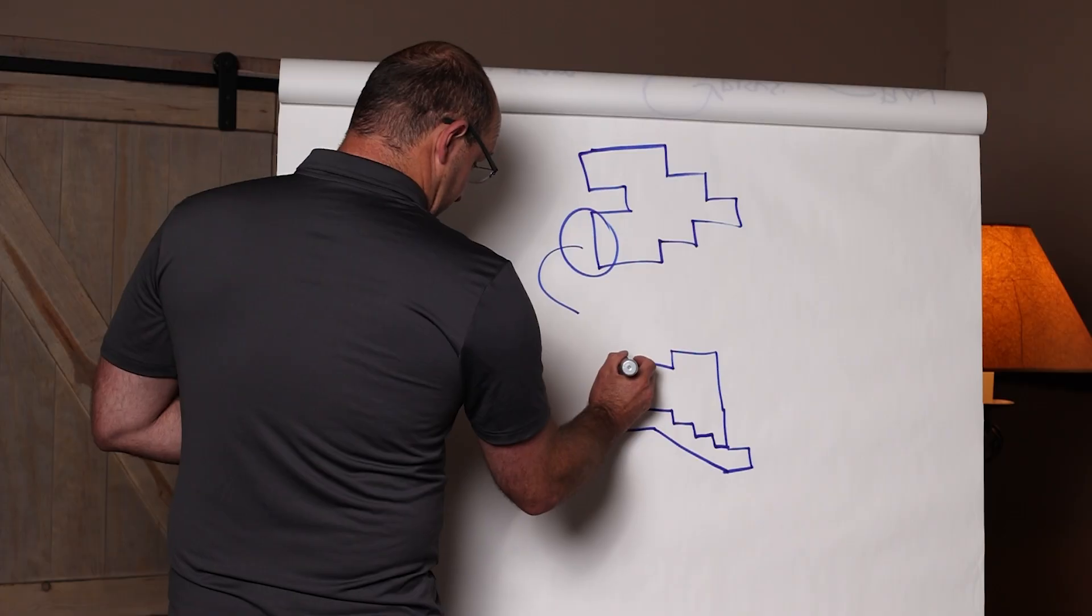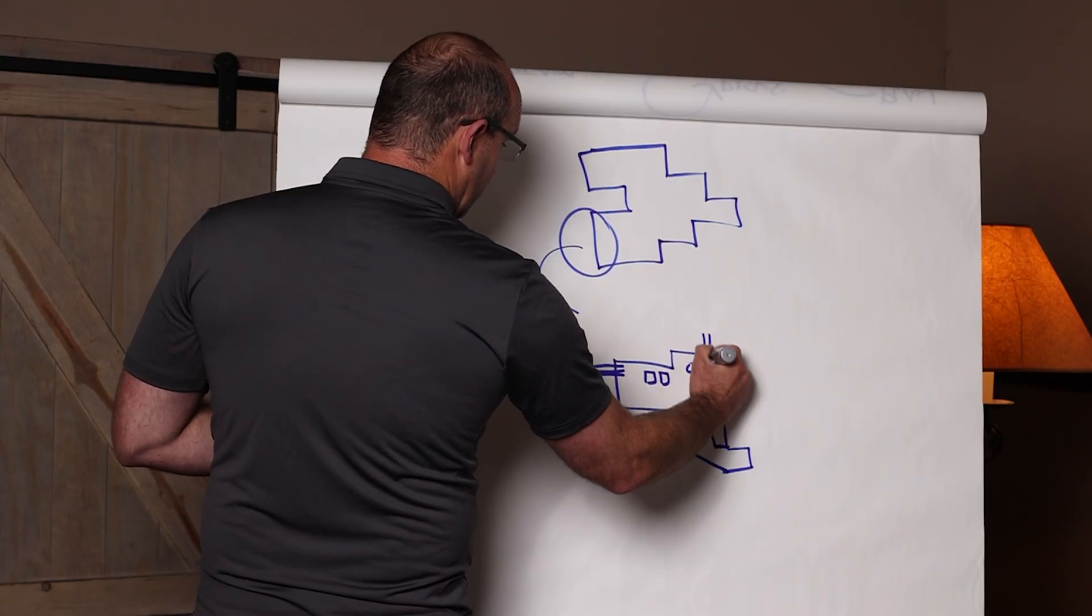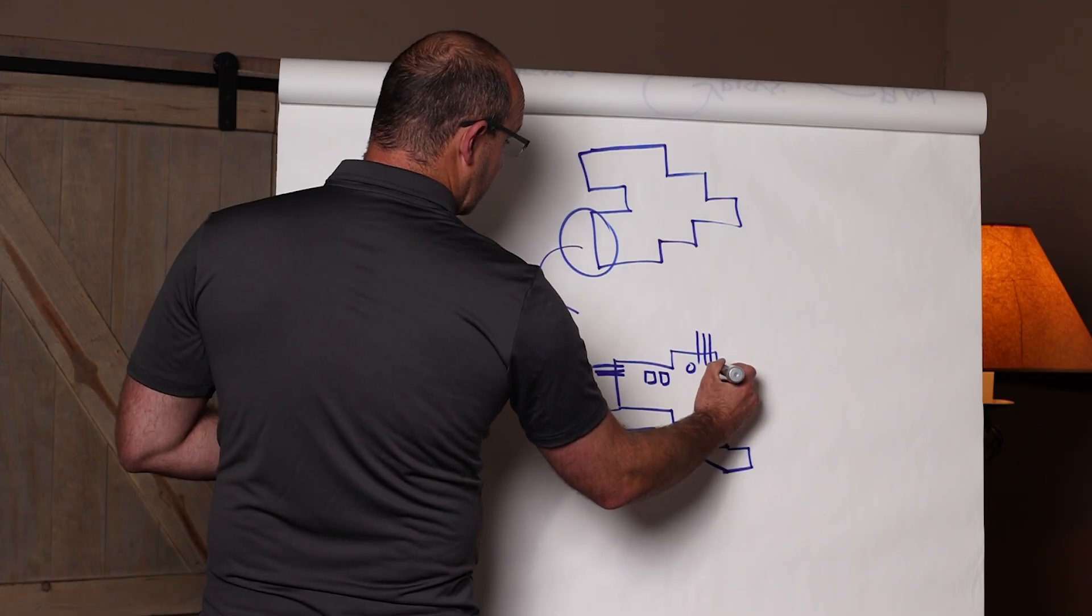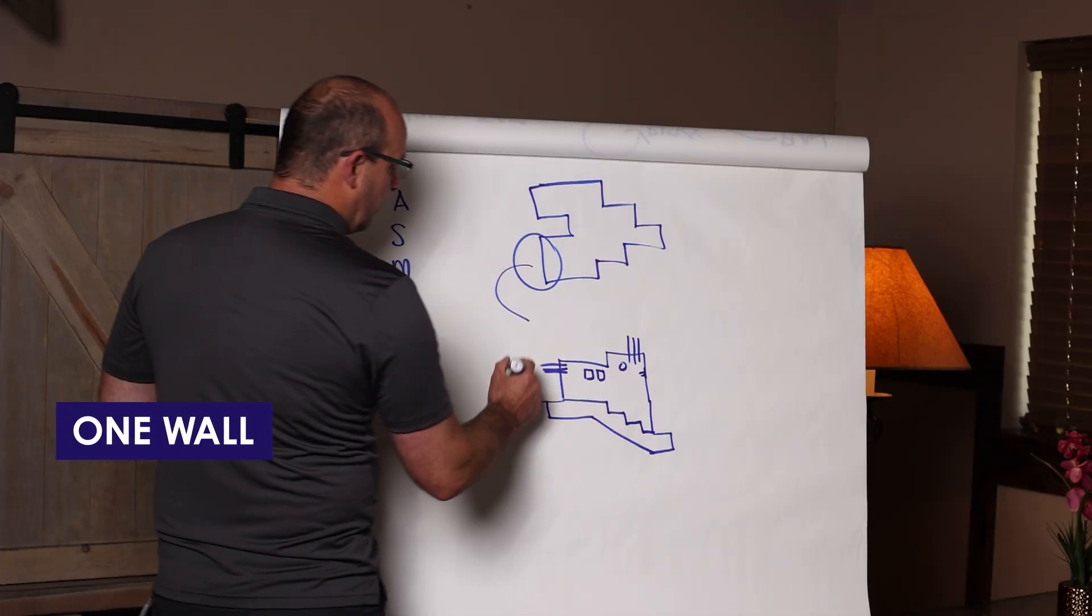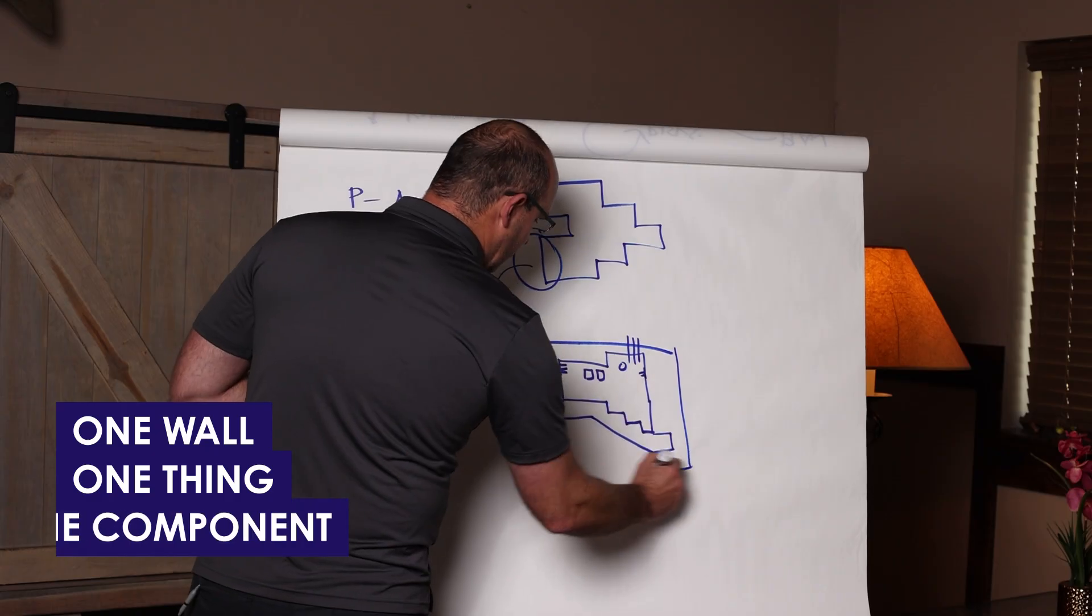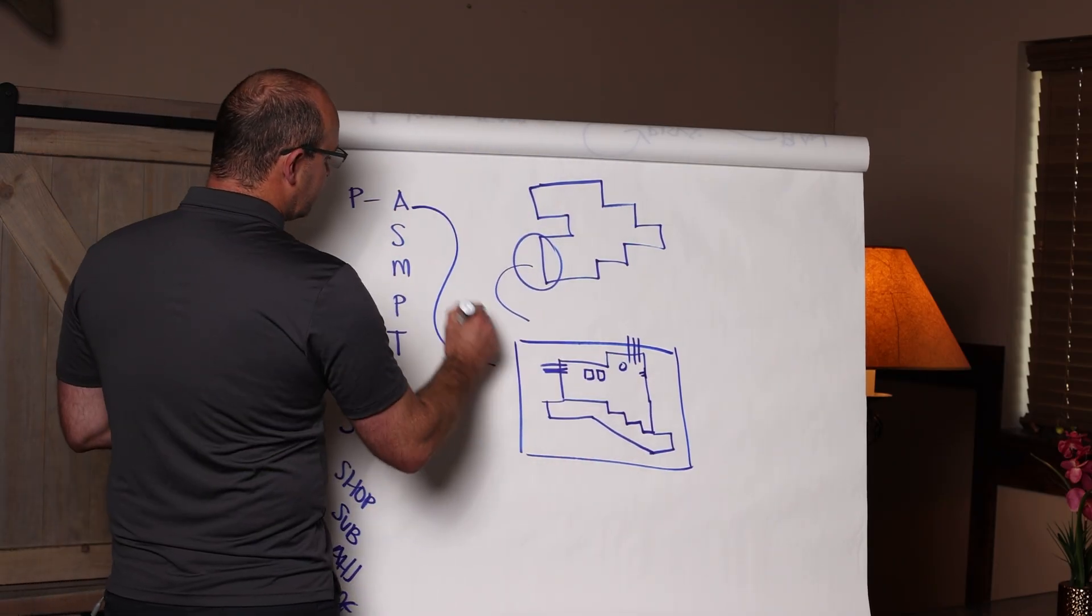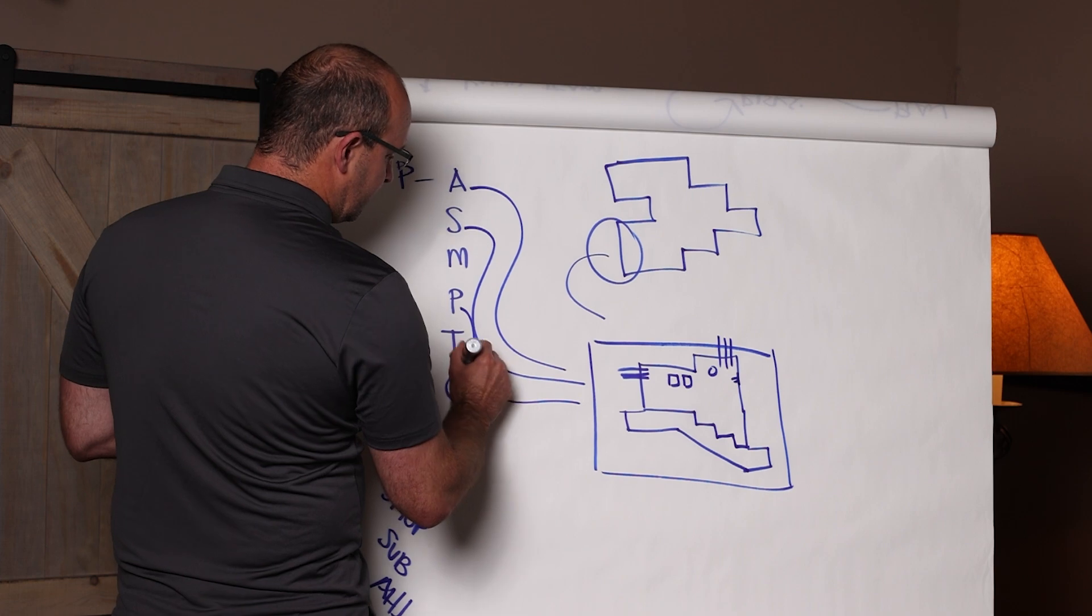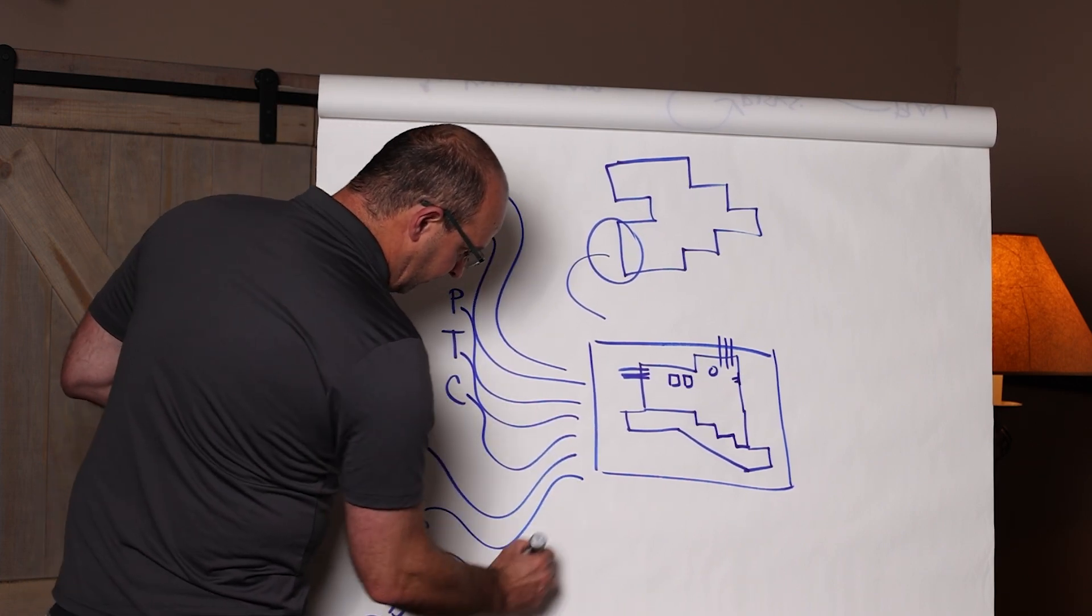I don't know how the footing would look. Typically it steps, but maybe there's reinforcing coming out, some embeds and opening, maybe some reinforcing coming out the side, whatever the case may be. Maybe there's another embed. That one wall, that one thing, that one component, you're going to go build. A lift drawing lifts the information from all these drawing sets and puts it in one location for you to build.